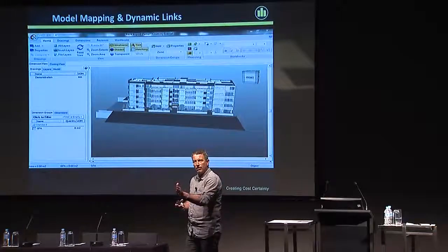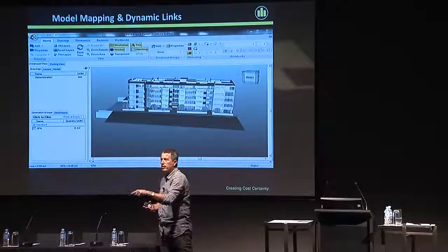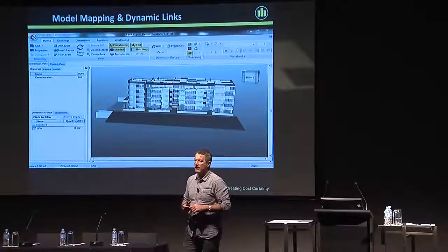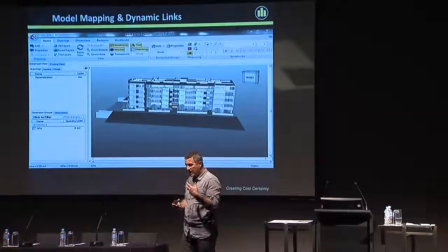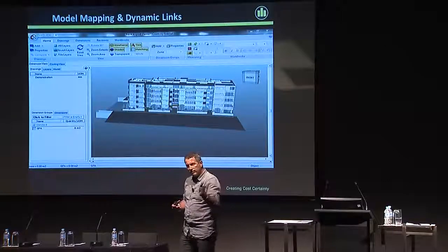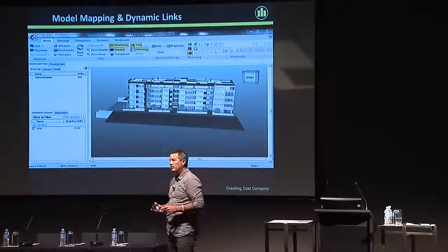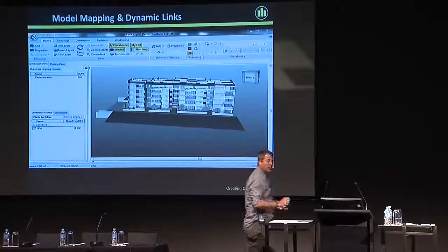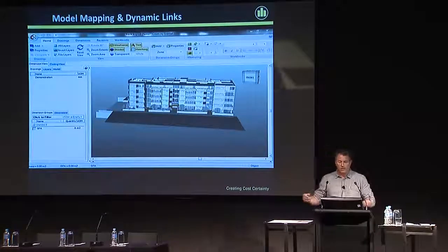As we progress along, we might want to know what the different types of carpet are. As we progress along further, we might want to know how many individual tiles there are and how many boxes they account for, the different patterns within that pattern that's being provided. And as long as the level of development of the model progresses, these things can be driven from a map.